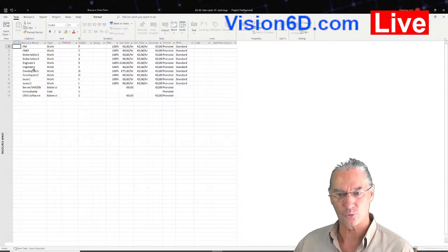That resource sheet, which is here, already has all the resources that I want to use and that I was talking about. I simply keyed them in, and if you follow the topic on resources, then you will see how you have to do this. But I will take the first one, which is the PM, the project manager, and it's defined as a work resource. As a work resource, you see here, we can define a standard rate. I have already defined standard rates. You see here down, for example, for the engineer, I have defined a standard rate of 100 euros per hour.